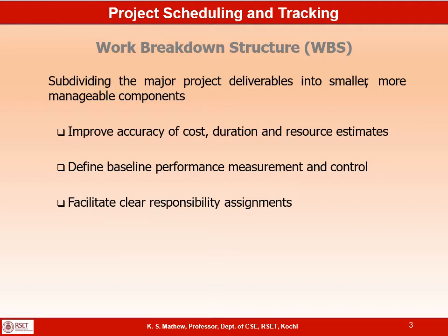All this can be done when we subdivide the major deliverables into small sub-deliverables. If the deliverable is a big chunk of work, we will not be able to estimate it accurately, and it is also not possible to assign the entire responsibility for that big module to one individual. Whereas if you break down those big deliverables into small sub-deliverables, the estimation becomes more accurate, and we can assign responsibility for each individual sub-deliverable to a person. That is the purpose of dividing the major deliverables into sub-deliverables, and finally you will get something like a tree structure.